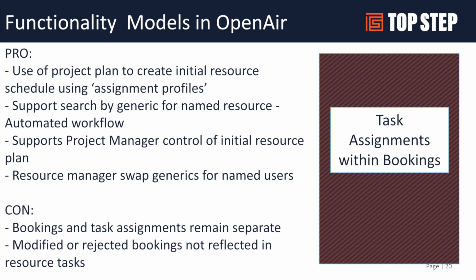It really gives the project manager that initial control of their initial plan. The resource manager then takes on those requests and fulfills them, and the PM gets alerts as folks are added to their project, so they can go and assign them the tasks. Whether you do it manually, through the standard feature, or even through the scripting, they are still separate records and separate elements that need to be managed.